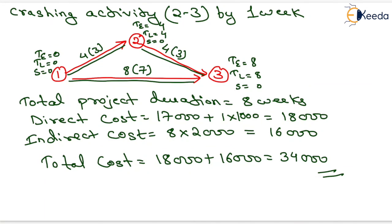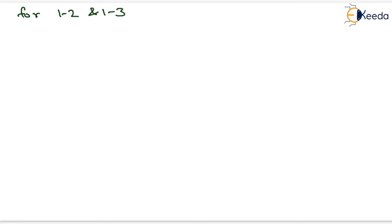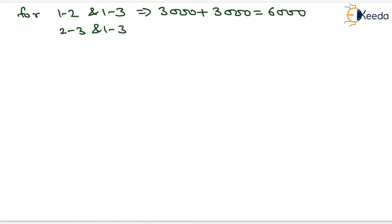If we crash activity 2–3 by another 1 week, the critical path will change. We have two options: crash activities 1–2 and 1–3 by 1 week each, or crash activities 2–3 and 1–3 by 1 week each. Cost slope for the first combination is 3000 plus 3000 equals 6000 rupees. Cost slope for the second combination is 1000 plus 3000 equals 4000 rupees. The minimum is 4000, so we choose to crash activities 2–3 and 1–3.